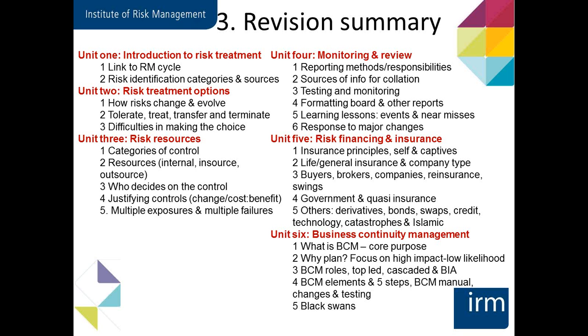You'll treat it first before you transfer the residual to somebody who will manage the risk more economically. But at the same time, don't forget that by transferring the risk, you don't transfer the whole lot. So you're still liable to having to do a bit more treatment even after you've transferred the risk. That's an important principle underlying insurance.